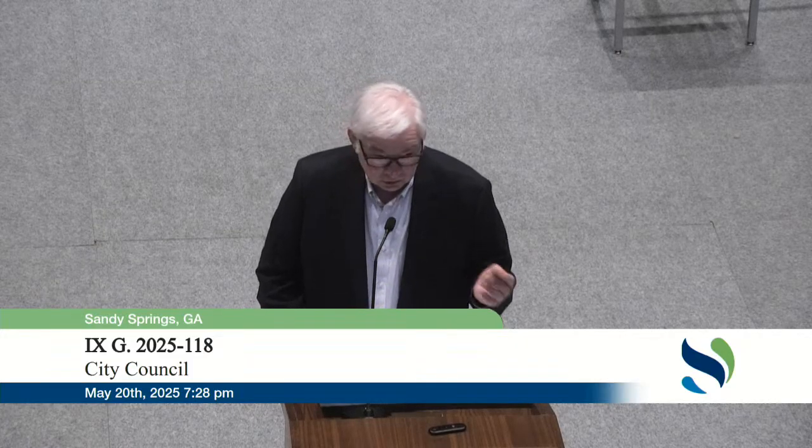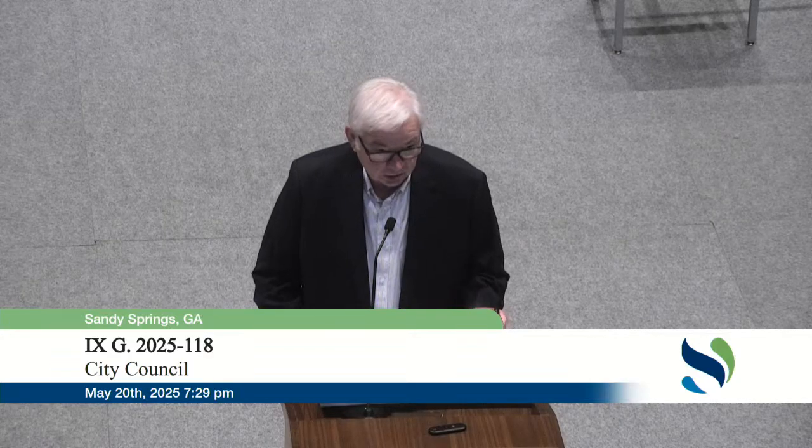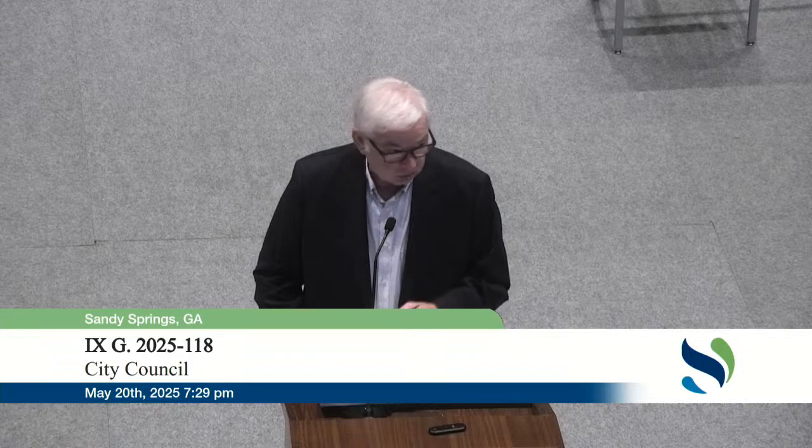$218,379 includes the remaining environmental studies needed to obtain environmental permits for the construction project, a very significant update to fly-through videos as we communicate to the public what comes next, and as well studies and additional staging plans that needed to be considered as we reviewed options for what about the opportunity to leave 643 Laurel Terrace in place and occupied for perhaps longer than the original start for the remainder of the construction project, given the initial indications that the occupant there may want to be able to reside there, and it was in the city's interest to allow that.